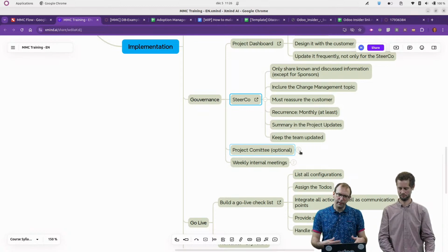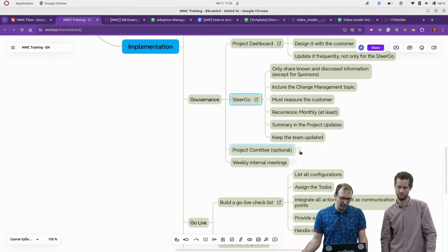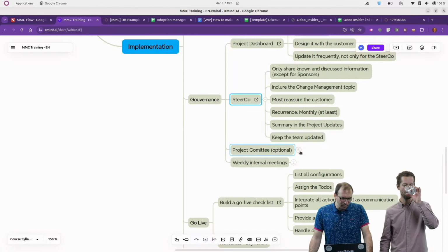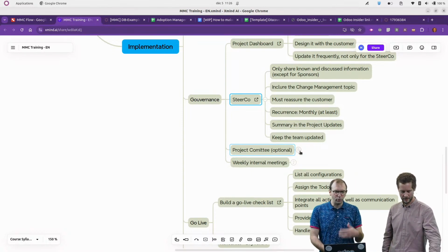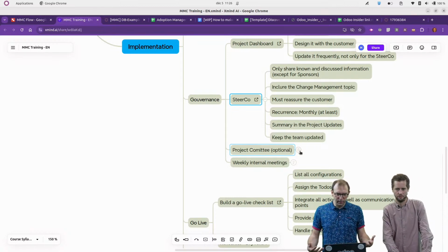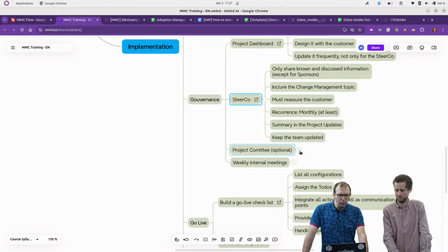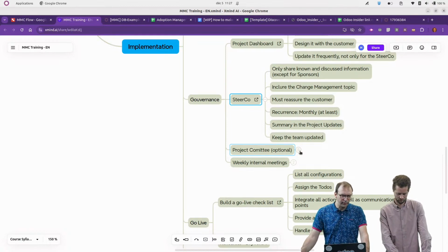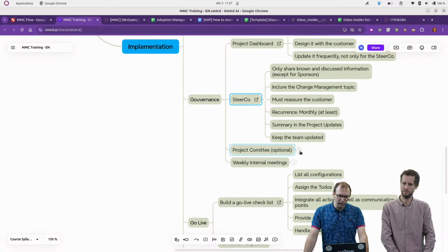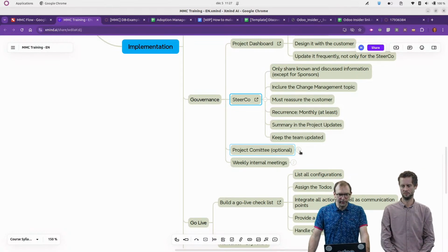When we do so, the idea is really to make things simpler. It's a difficult exercise, but really important for us to make sure that our tooling is also reviewed, refactored, and more efficient to use on the new projects we are working on, based on the experience that we had. For example, one thing we changed is making things less dark magic, like using automated ratios. Instead, we use a lot more people's insights, so the project manager and the BAs will provide information in the ROI tool.